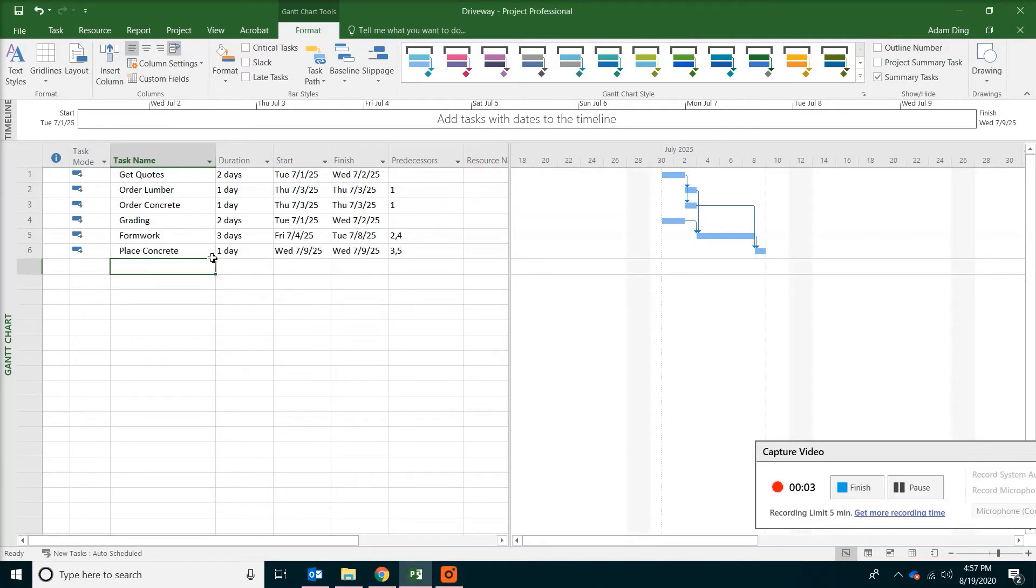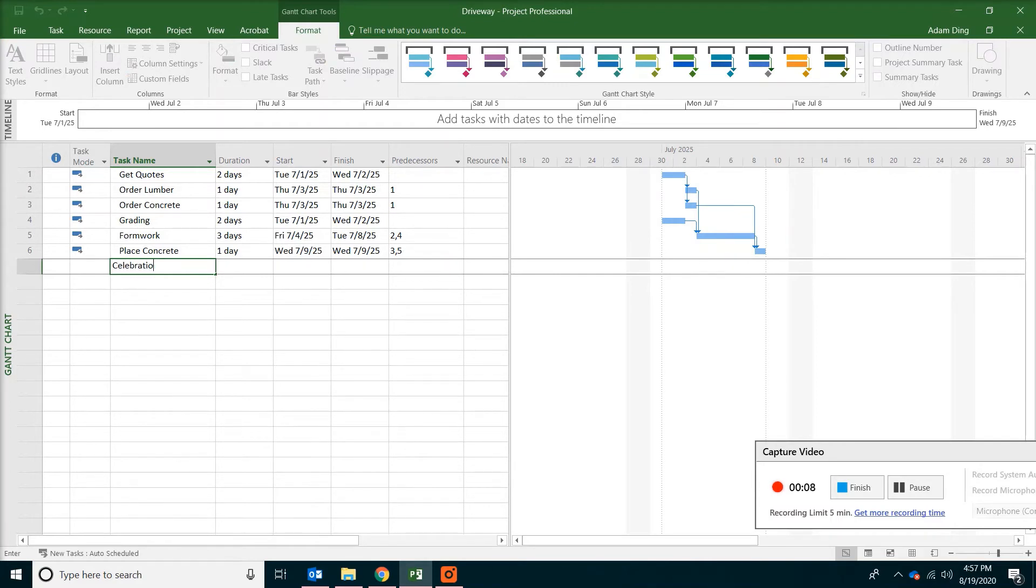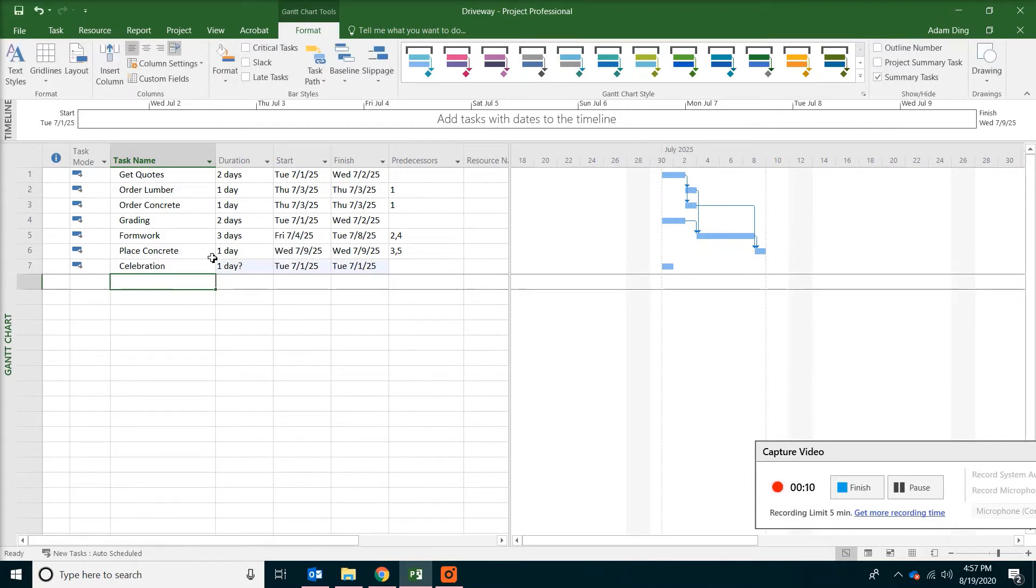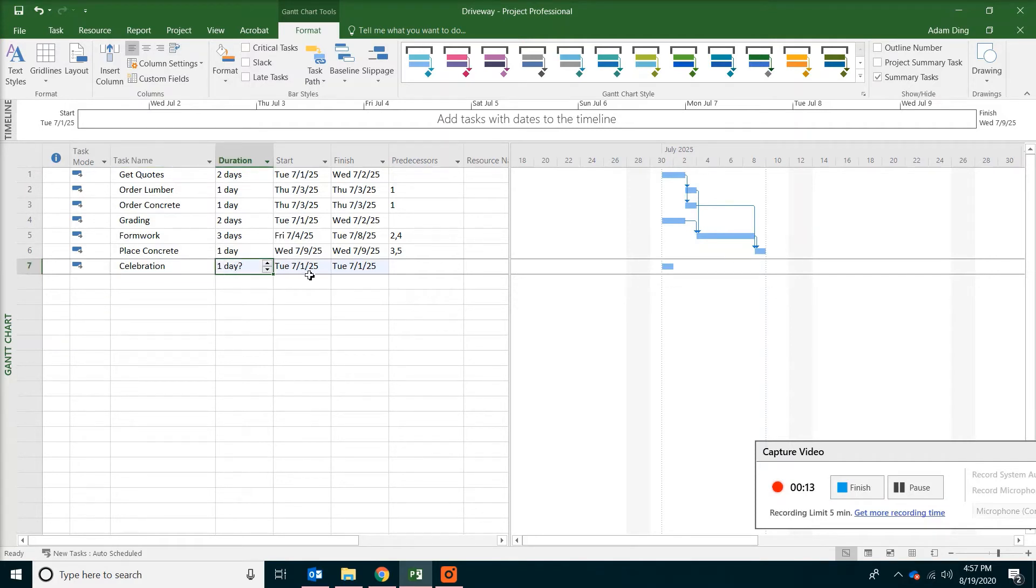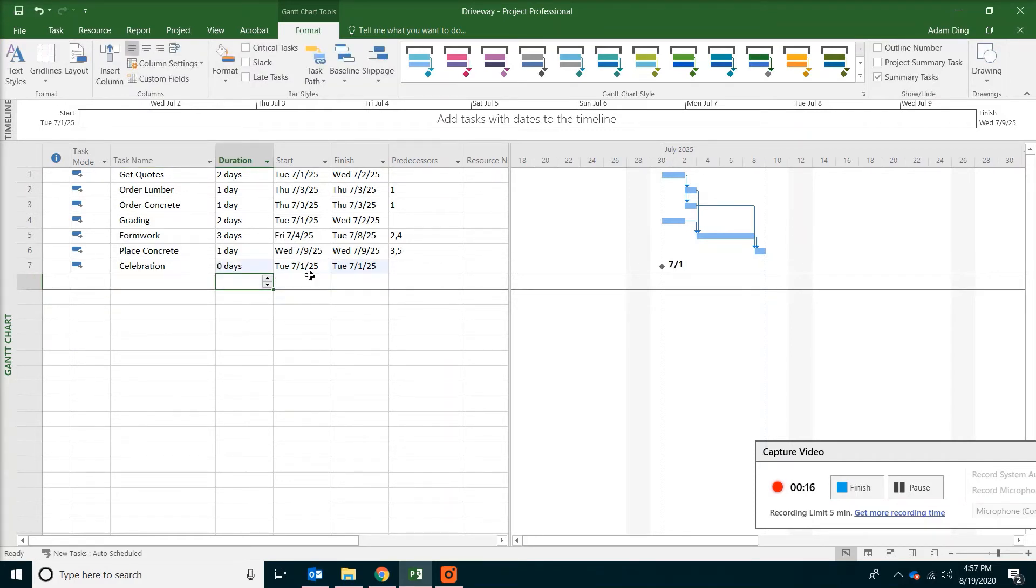Okay we are going to add one more task. Which is the celebration. After everything is done. So you can type celebration. And then just type zero for the duration. Because this one is supposed to be a milestone.